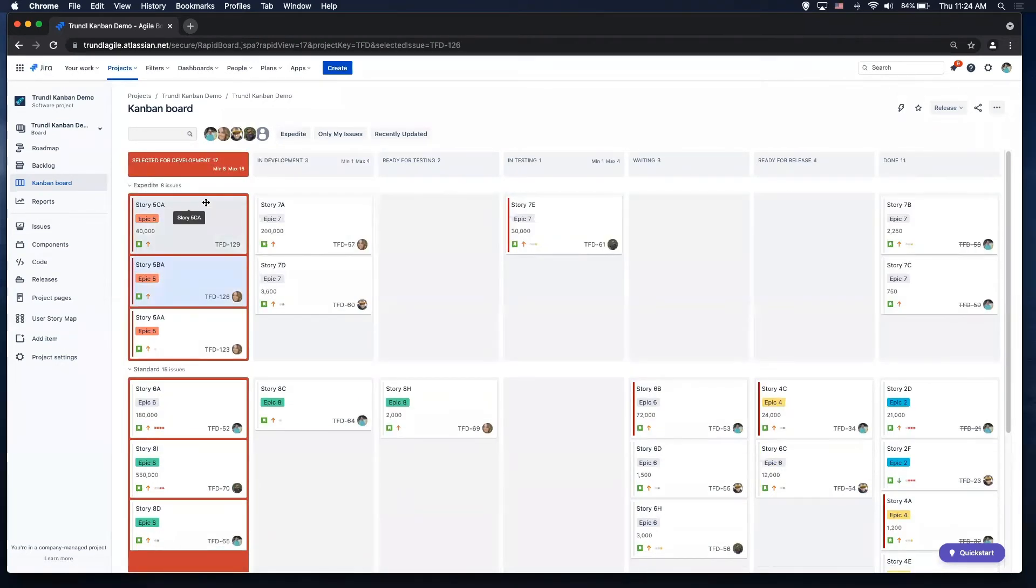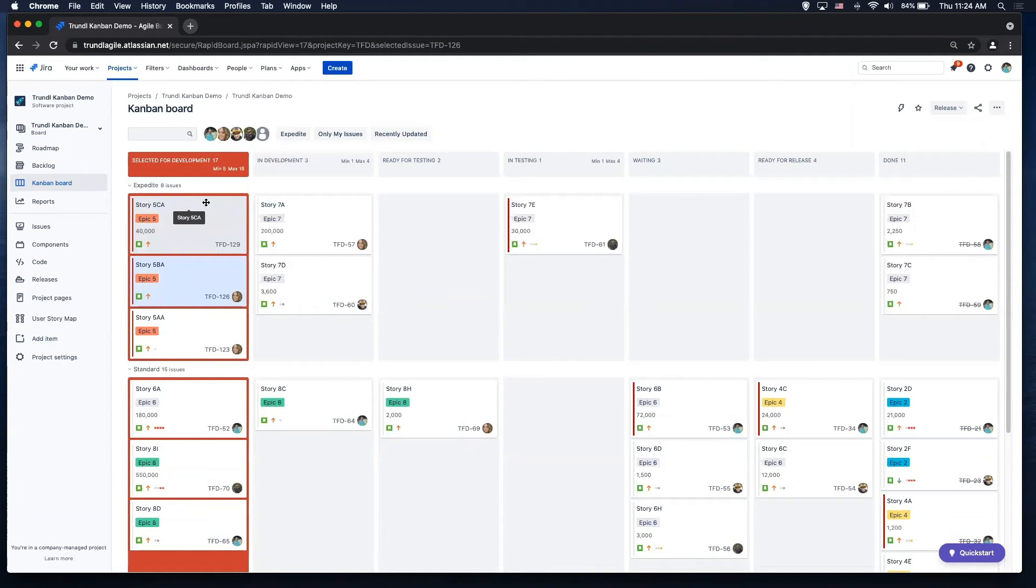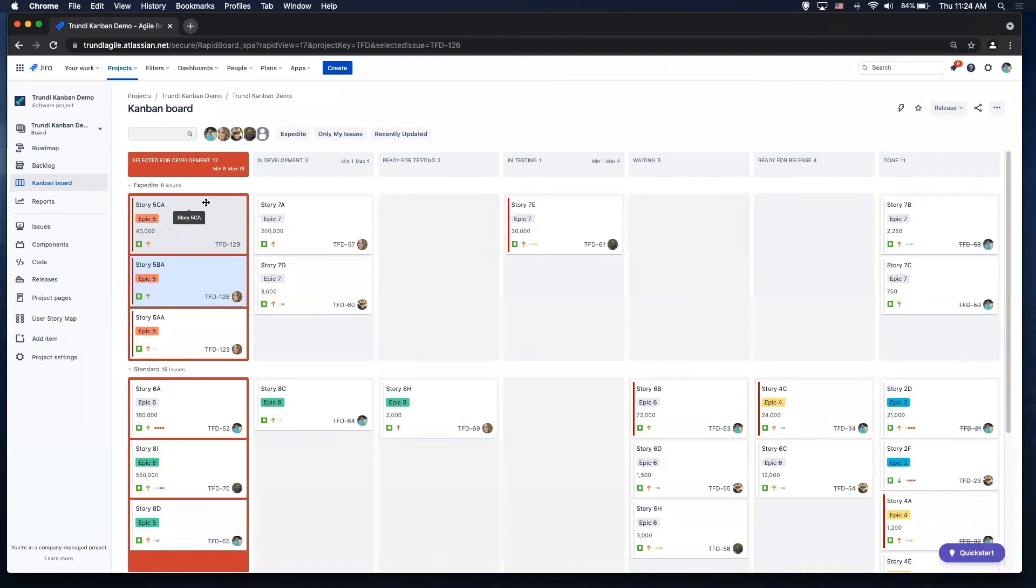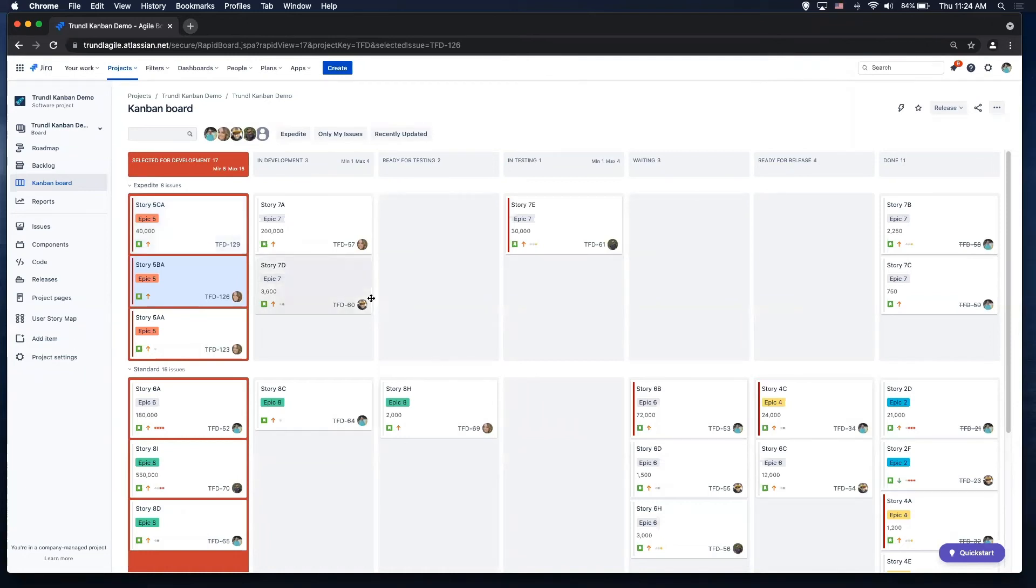Notice my workflow. My workflow has a bunch of different hold statuses as well. So I have my selected for development, that's kind of a hold status. I'm waiting to start my development. It's super important, I feel, in Kanban to be able to measure that as well, to be able to measure how long things are waiting for something else or things are stale and stagnant, stuff like that.